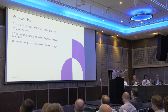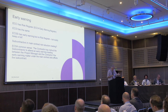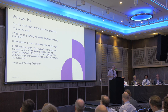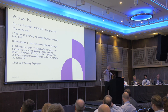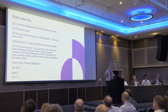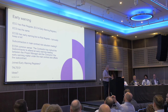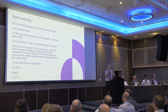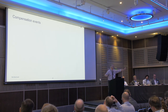ECS fourth edition specifically says we can get subbies into risk reduction meetings as a hint that it might be a good idea. Do we have a joined-up early warning register across the job between main contractor and subcontractors? The idea is to set up meetings to talk to each other, get the subbies into your risk reduction meetings. Can we not have a joined-up early warning register? Talk to each other.